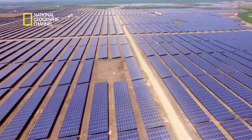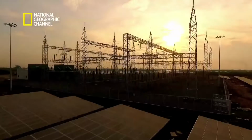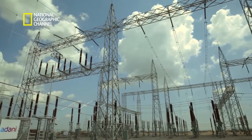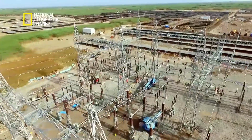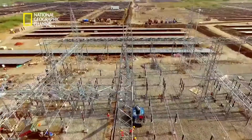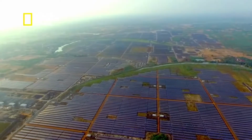It's a busy site with clusters of solar modules, dedicated inverters, control rooms, switch yards, and substations coming up, like an assembly line for power generation. The company's game plan is to keep commissioning pockets of electricity leading up to the final evacuation, or exporting, of the total capacity of the plant to the grid. Towards this, the site is being divided into 5 units of different capacities.